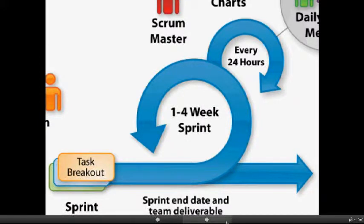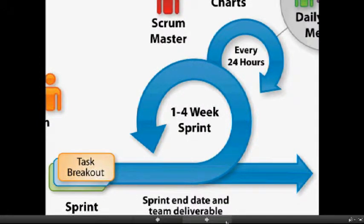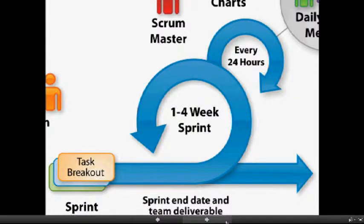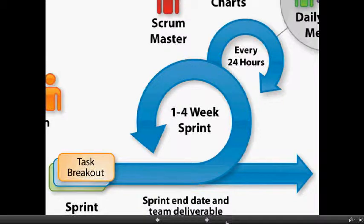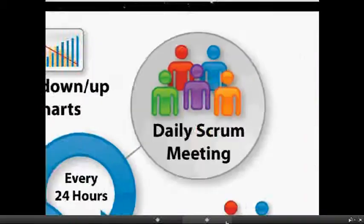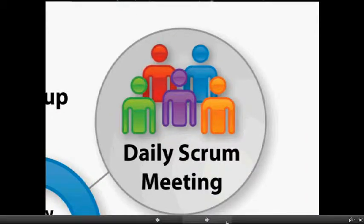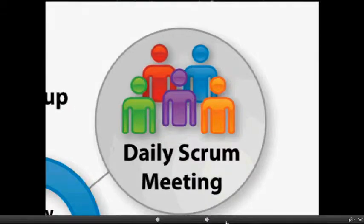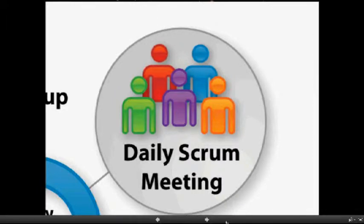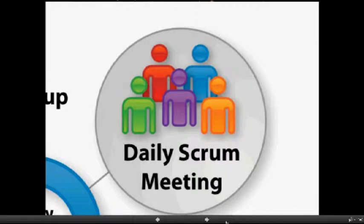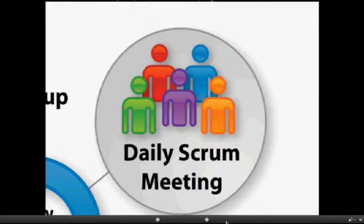Now, as the team knows what has to be done during the sprint, they start working on the project. And daily, the team meets up in a Scrum meeting. There, the team members share what they have completed since the last meeting, what they want to complete before the next meeting, and whether there are any impediments which might cause them to fall behind. These meetings expose risk and increase effectiveness.